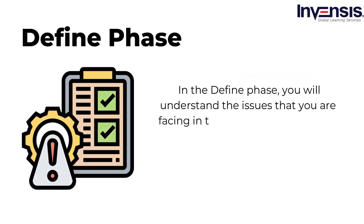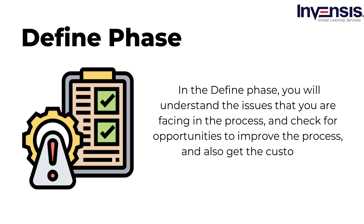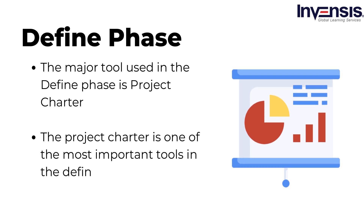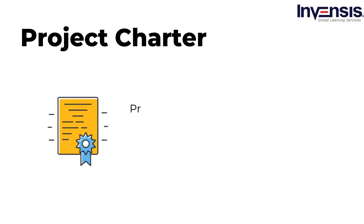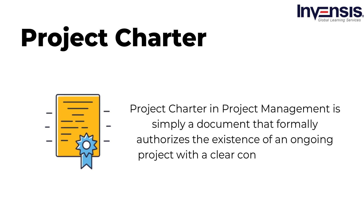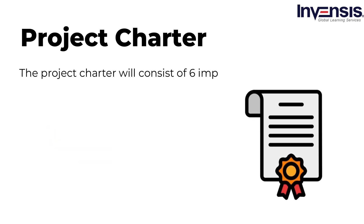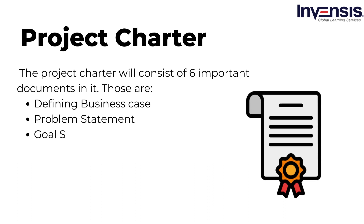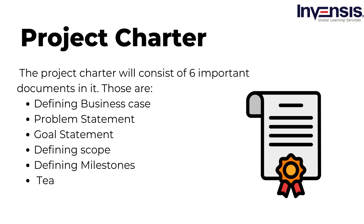In the define phase, you will understand the issues that you are facing in the process, check for opportunities to improve, and get customer requirements. The issue is considered as a single process and you work toward resolving it. The major tool used in the define phase is the project charter. A project charter in project management is a document that formally authorizes the existence of an ongoing project, with a clear, concise statement of its goals. It consists of six important elements: defining the business case, problem statement, goal statement, defining scope, defining milestones, and team charter.